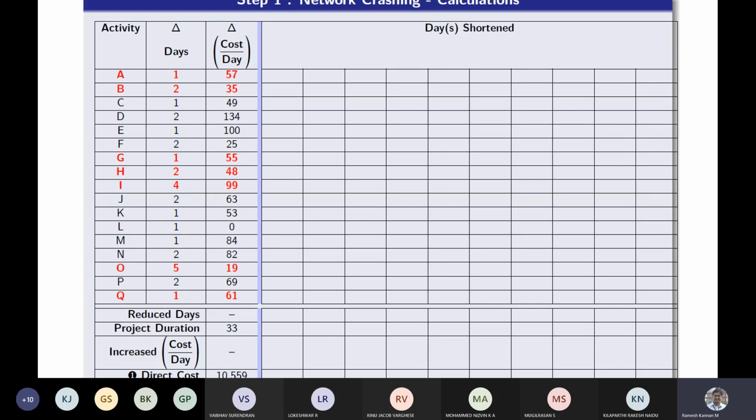In a basic CPM methodology, there is a concept that you cannot reduce the critical path. The reason is that it does not have any buffer, and it does not have any additional resources, something like that. But in this methodology, we have additional resources in the means of crash cost. So we have extra money so that we can reduce it by one day. But how much money we spend for reducing one day is the cost slope.